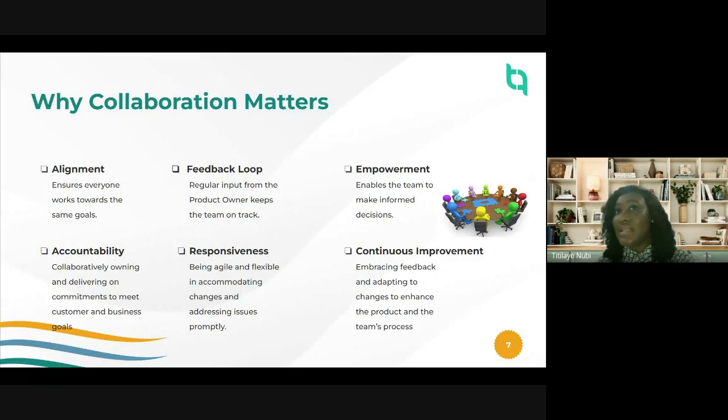When I use the word capacity, I'm looking at the availability and the knowledge, skill-based, everything; they're kind of interwoven. For example, if you're planning to deliver something, whatever it is, and you have somebody on your team going on leave in the next 2 days, and the person will be on leave for 20 days, you are already setting yourself up for failure, because you already know that availability in terms of human capacity on the team is not there, or it's not going to be there in a few days.